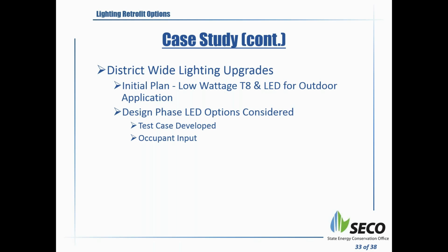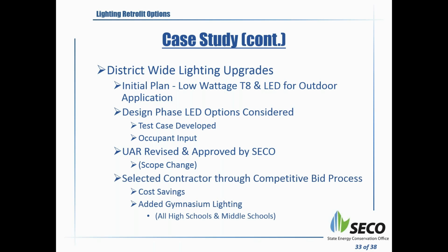The district decided to do a test case because LEDs were still new. So they had a test case in which they got occupant inputs and then reviewed the installation for almost 1 or 2 months, and we did some pre and post foot candles and so on and so forth. And then once we were pretty confident, United ISD applied to SECO and did a scope change in which they requested that instead of doing low wattage T8s, we are going to do LEDs for the interior. The scope change went to the SECO review process, and then it was awarded.